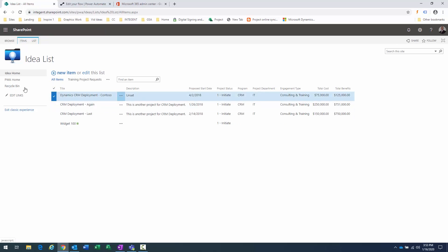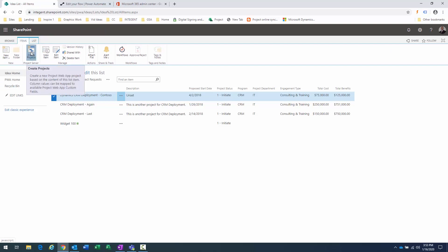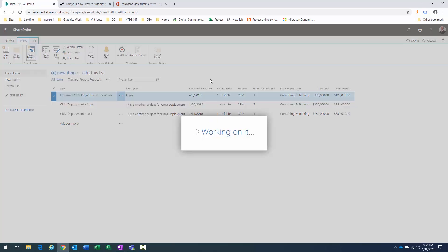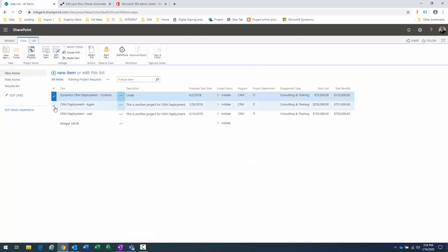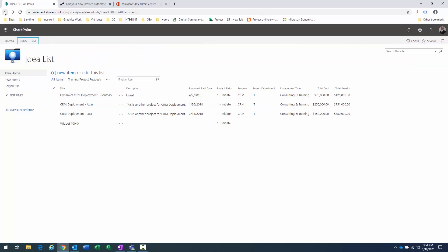You can promote items from this list to projects. Click on an item, then in the item ribbon you'll see the 'Create Projects' button in the Project Server section. Clicking that brings up a dialog box showing column names from SharePoint mapped to column names in Project Web App. Any fields I have here won't need to be re-entered. I can specify which EPT it goes to, click the 'Create Project' button, and the project gets created in Project Online. I can do one, five, or 50 projects at one time.